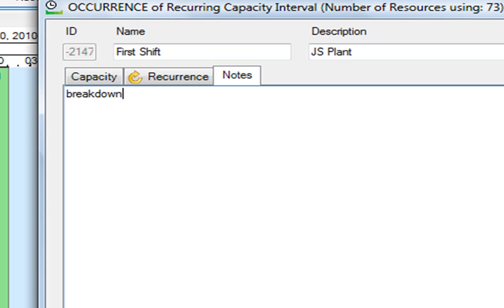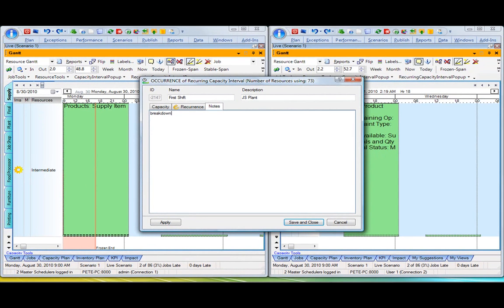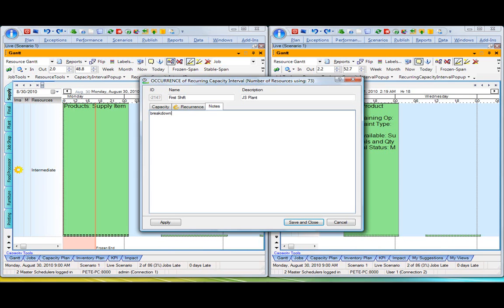When I apply this, when I save and close this, not only will you see the supply plant adjust its schedule, but because of the way I have my material constraints set up and the flow of products across plants, you will also see at the same time on the right-hand side the automatic rescheduling based on constraints of downstream operations. This is a simple example to illustrate the concepts, but the same principles apply no matter how complex your flow of materials and resources might be.